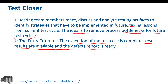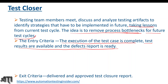All defects should be reported to the developer, fixed by them, and closed. So the defect report being ready means all defects are fixed and closed. That is the entry criteria for test closure activities. For exit criteria, we should have the delivered and approved — and signed — test closure report from the client. That signed copy represents the exit criteria for test closure.